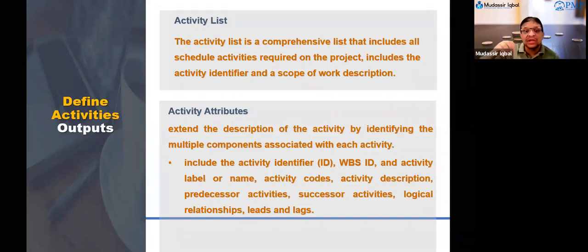Activity attributes need to be used to identify the person responsible for executing the work. So paint is by Mudassir. HVAC work is by Mr. Iqbal. The electrical work is by Hasib. I mean, all these things you will be looking at. So your attributes will define the paint.